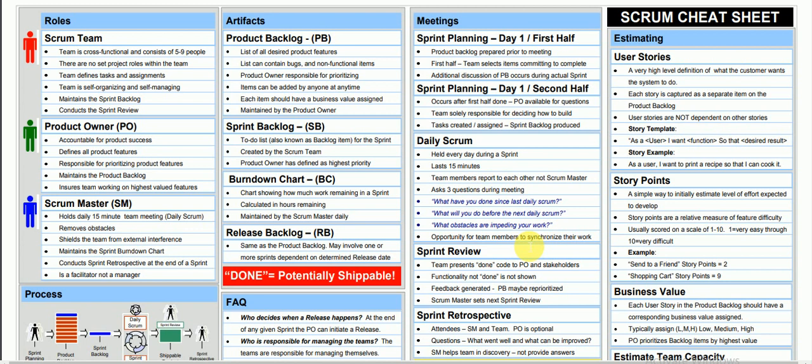The number of developers and testers will vary, and also the scrum of scrums will be there. The agile process says not more than 7 to 8 people in a team. If more than 7 to 8 people are there, then they come under a separate Scrum team, because very small teams give more productivity. That is what the agile process says. So the Scrum team is the developers, testers, DB people, or whoever is working for our project, for our module, or for our functionalities.